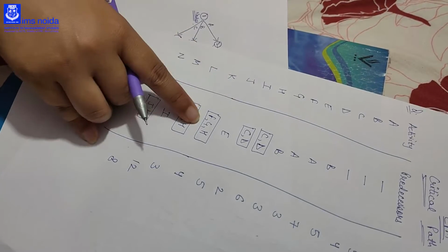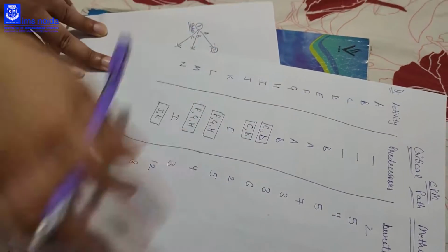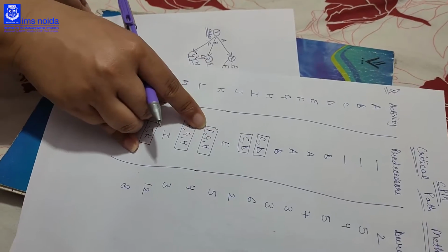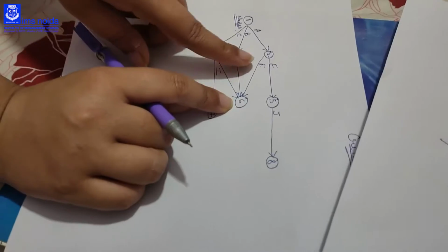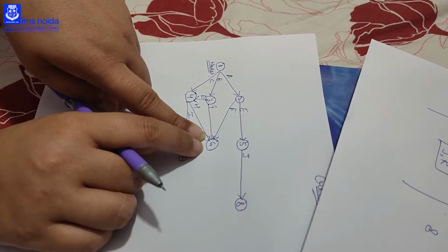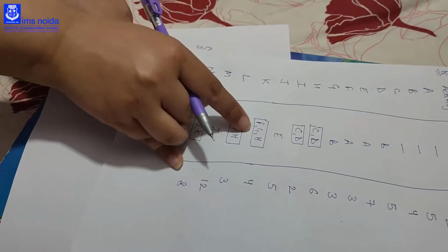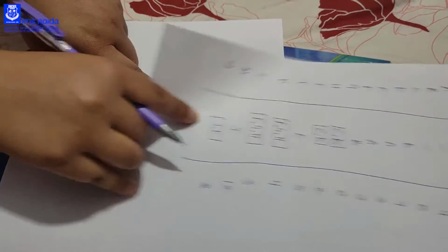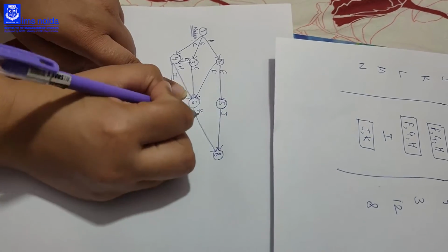Then K is starting with the FGH and it is combining with the J. So we have to combine the K node with the J node, starting with the FGH. The node combined of FGH is this 6. So we start K with the FGH node, as you have seen in the question. K is starting from the combined node of FGH and it is going combined with the J. So we will make it combined here with J, that is K.